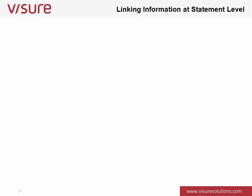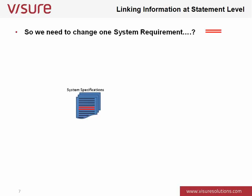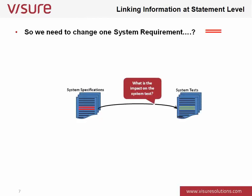We talk about information traceability at statement level inside multiple project documents — not at document level. If one statement needs to change, we need to think about what is impacted or touched by that change. For example, if the system specification says we're going to be changing the colour of a box from red to green, what are we actually now testing for? If no one's told the test engineer they're testing now for a green box, then the test will fail because they're looking for a red box. That's a simple example, but it gives you some idea of the value of traceability.